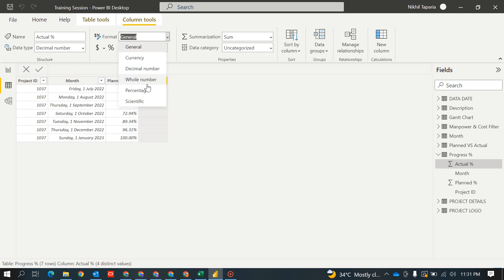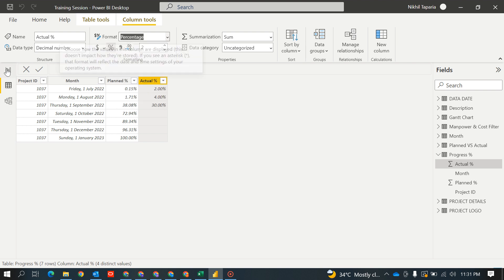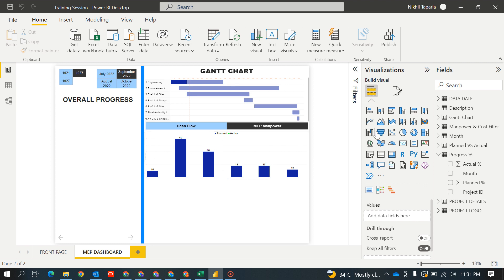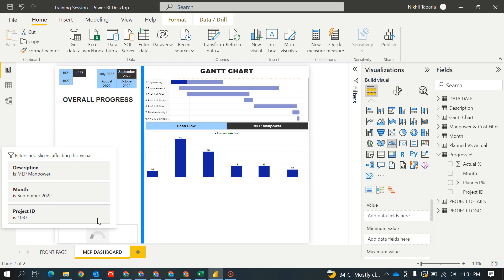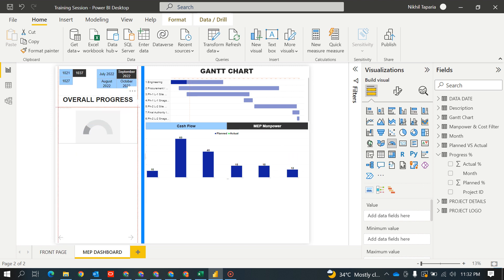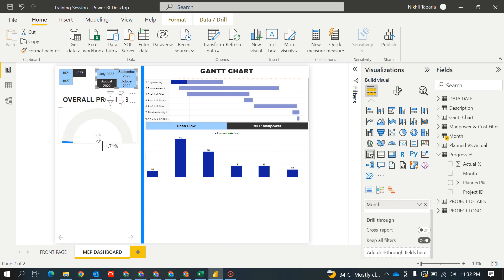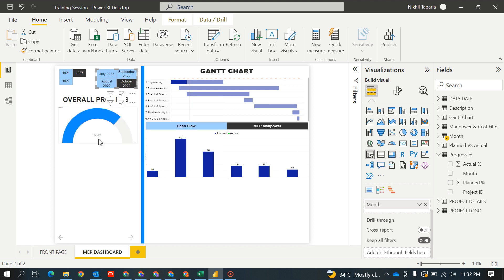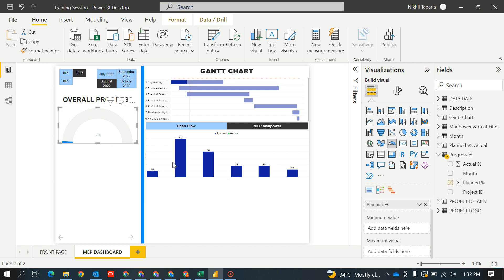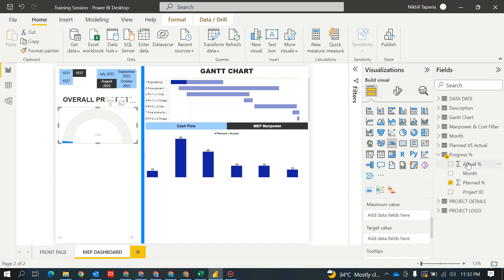Let's see the table. I want this in percentage — this also I want in percentage. So let's start our gauge for the overall progress. These are the planned values and these are the actual values. I will drag the planned value up here. In August we want to achieve 1.71 as planned, in September it became 38.08, in October it became 72.94. Now I want to include the actual value.